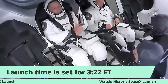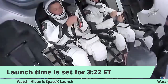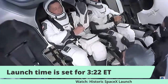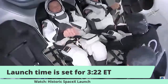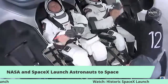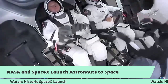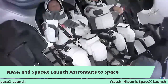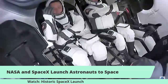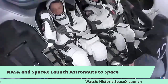The Falcon 9 team is preparing for final checkouts and propellant load. Those checkouts are due to begin at T-minus 2 hours, some 42 minutes from now, when the launch crew officially gets on console in the firing room. All systems on Falcon 9 are currently go. The range continues to be green on the support side. The areas around the pad are obviously clear, except for the folks doing the entry into the capsule. Air and sea space are clear. We hear a helicopter go by from time to time.